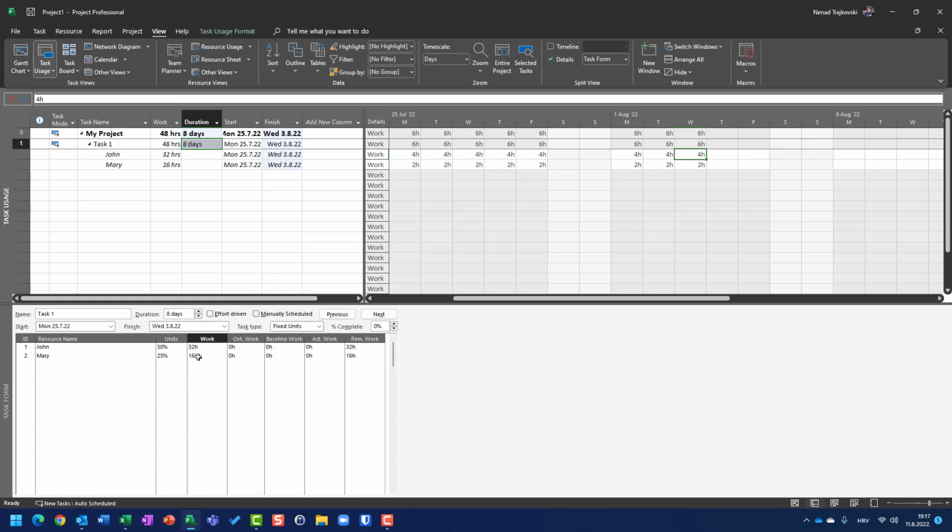Mary, on the other hand, is going to work 16 hours, but only 25% per day, and 25% of 8 hours is 2 hours per day. So she's going to work, let's say, also 8 days.